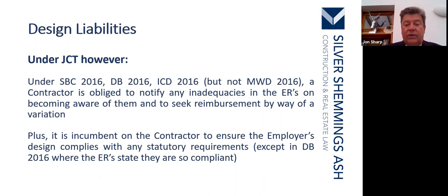Plus, it is incumbent on the contractor to ensure the employer's design complies with any statutory requirements, except in DB 2016, where the ER state they are so compliant. So again, the contractor finds out that the employer's design does not comply with a relevant statutory requirement, can't complete the build without it doing so, he incurs additional costs, he applies to vary the contract.